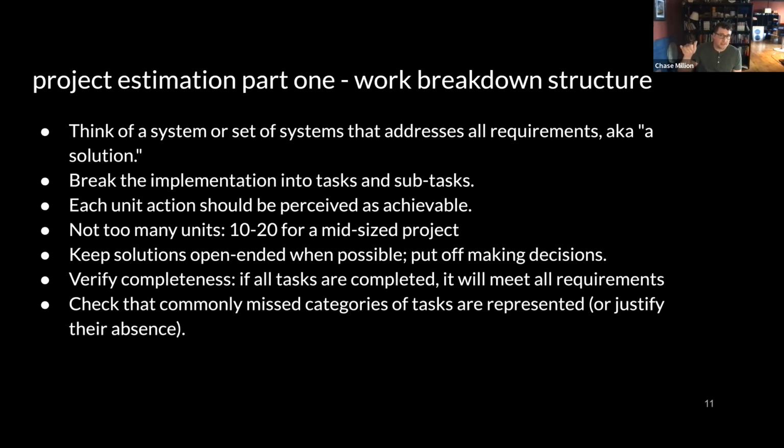Also, even though you have a technical solution at this point, avoid making any unnecessary technical decisions. If there are things that you can leave open-ended at this stage, do, because later in the project, when it comes time to implement those things, you'll have a lot more information and a lot better basis to make informed decisions about how to do that stuff. And then again, the quality of your estimate will rely inextricably on the completeness of your work breakdown structure.